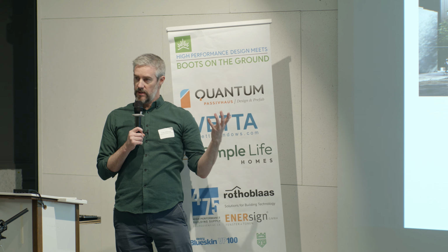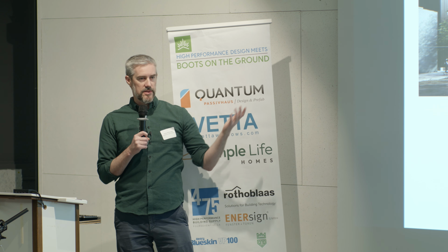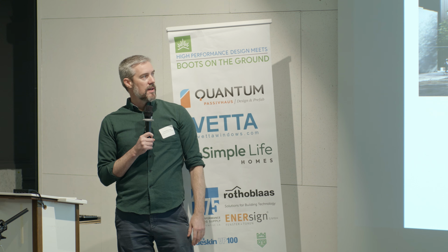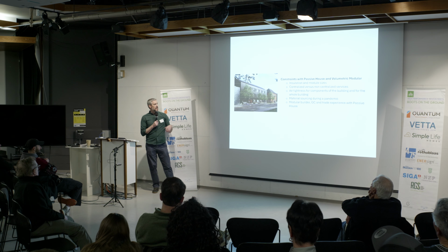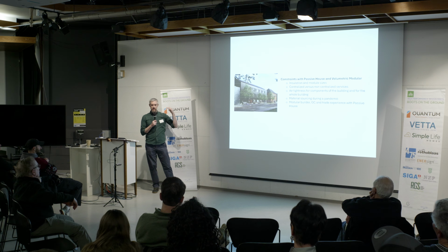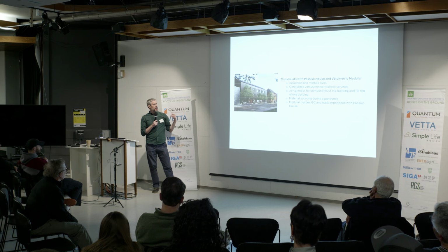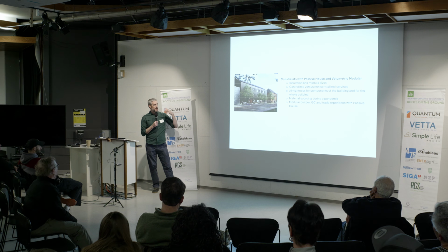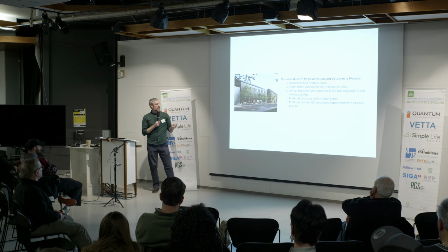We were looking at it and we can't get windows. Passive House windows are just not available right now. Centralized ERVs not available. And so we had a long list of orders that had to happen as soon as the contract was awarded. Instead of being able to source windows locally, we ended up getting them from Germany. And that had its own issues, which I'll get into in a bit more detail.